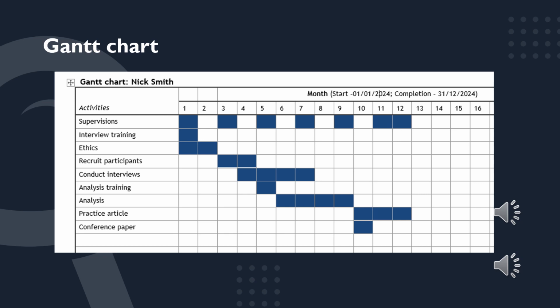At a general level though, you'll need to consider how much time you're dedicating to your fellowship. Working full-time will usually allow you to do things more quickly than working 2 days a week, though some activities are dependent or partly dependent upon others, such as getting ethical approval. And so the amount of time it takes is not down to how much time you have, but how quickly another person or another organisation can do something, in this case process your ethical application.